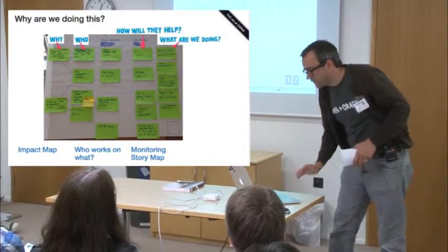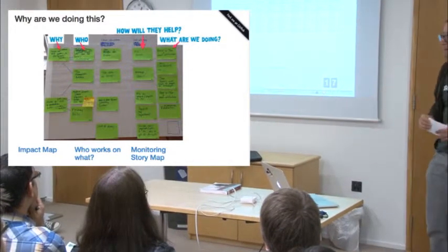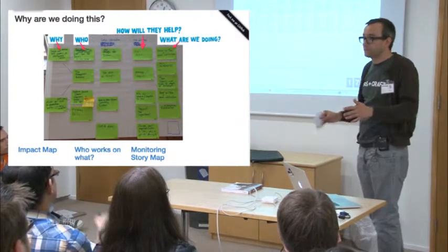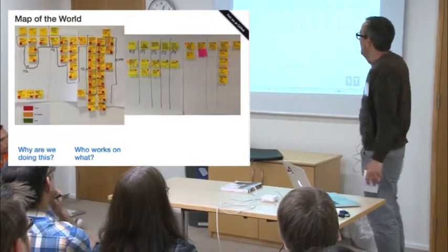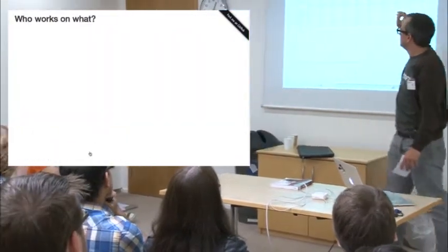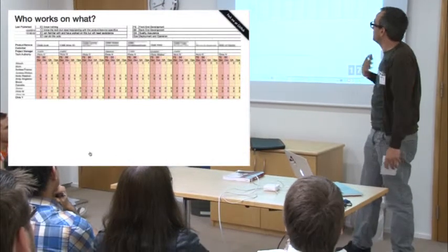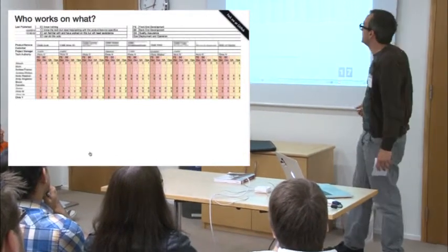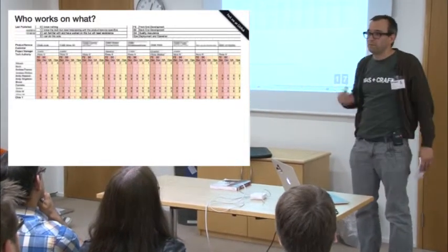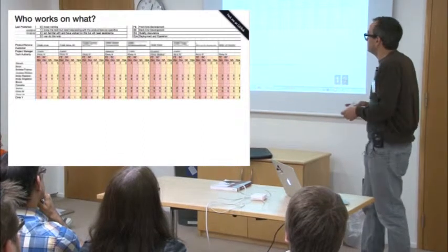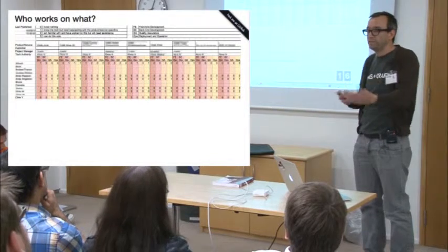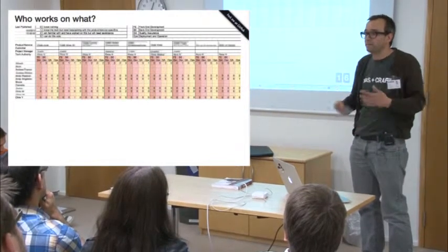Skills matrices, cool. So this is stolen directly from Chris Matz, and the idea is that you get everyone to self-score themselves, to say how adept they are for a given project: do they know nothing about it, know the underlying technology but would need some help with pairing to get up to speed, are familiar but would need some assistance, or can do it solo. Using this information, when new work comes in, you can look at this and say, right, we need this to do. Who can do it? Who could we assign this piece of work to get it done? And you can have different policies around that.